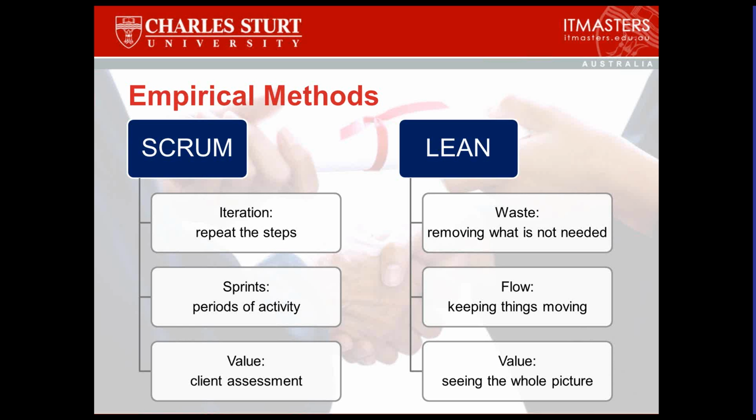Can we do that with Agile? Yes, we can. And that's the process point that we're talking about here. The cost can become the strict control variable, and the outcome can be the more malleable variable in that situation. Now, hopefully that does go some way to answering the question on that. I'm just seeing a couple of other questions here that I'll just jump in on and have a look at.